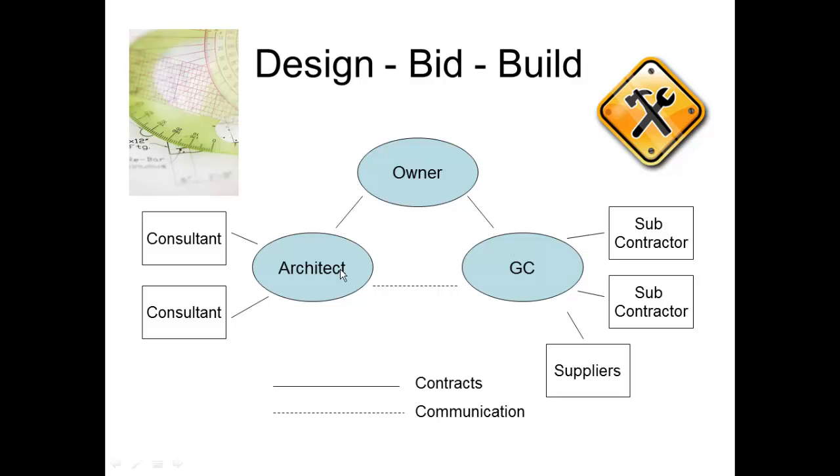The architect would say, well, we think so, let's check with the owner. The owner comes back and says, yeah, that seems like it's okay. The architect goes back and says, yeah, go ahead and bid that product. And they may put an addendum out that says this also is an available product. So it becomes a very dynamic conversation between architects, contractors and owners to determine what exactly is the right thing to supply for the project. And we don't want to make it too cheap, but we don't want to make it so expensive that it becomes an issue.